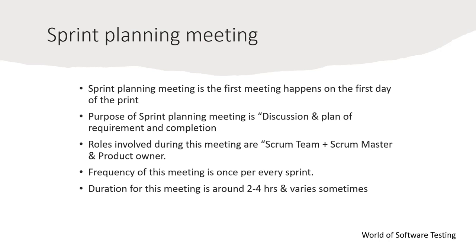The purpose of the sprint planning meeting is discussion and planning of requirements and their completion. The test lead and development lead do resource and job allocation, while the product owner explains the user stories so everyone is on the same page. Roles involved are the scrum team, scrum master, and product owner. Frequency is once per sprint and duration is around two to four hours.